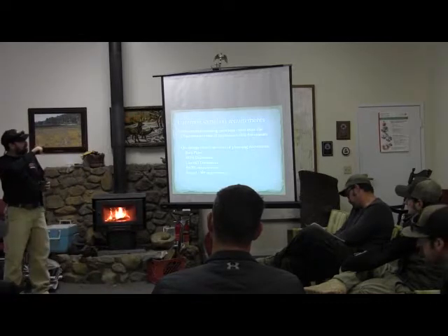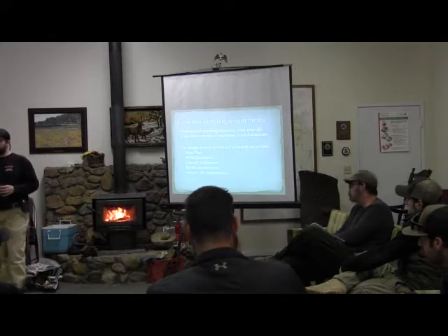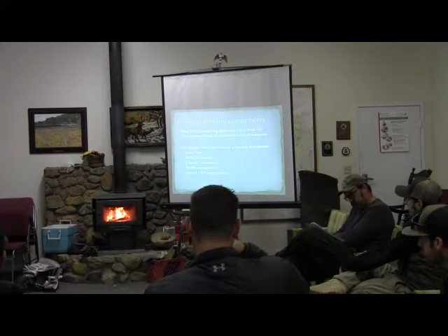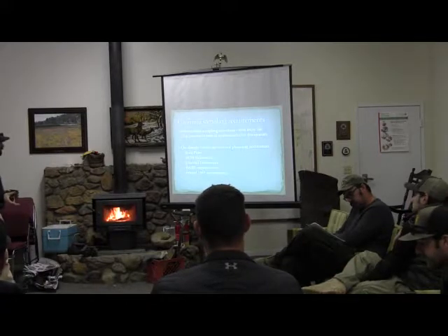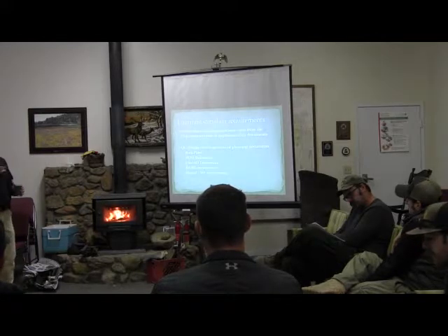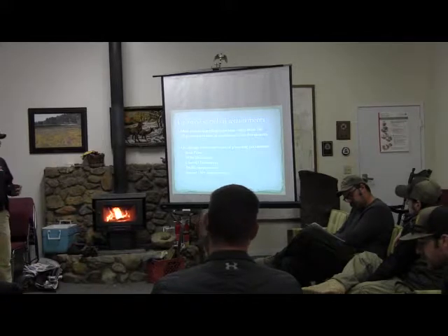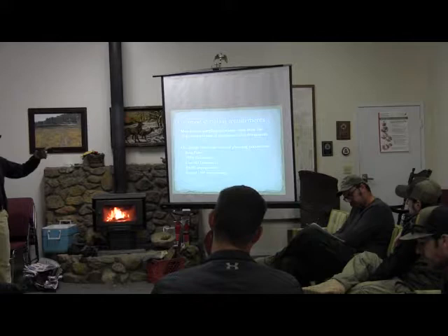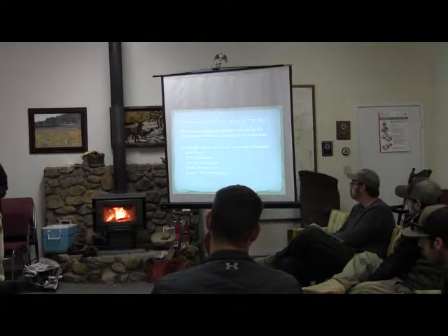So breaking this down, most project sampling questions come from the objective section of the implementation document. There are always objectives in a burn plan, and there should be objectives in a contract too. So your sampling should be coming from that. Or it could come from the NEPA or the planning document, but the implementation documents flow from the planning document, so this should all be the same. Design criteria sections of planning documents are the same. You can find it in the planning documents too.